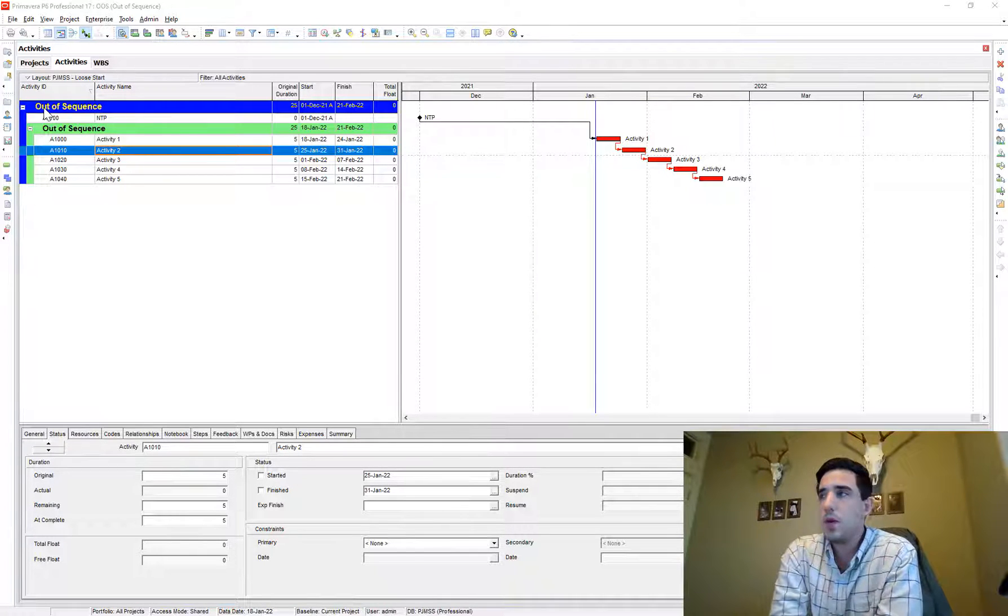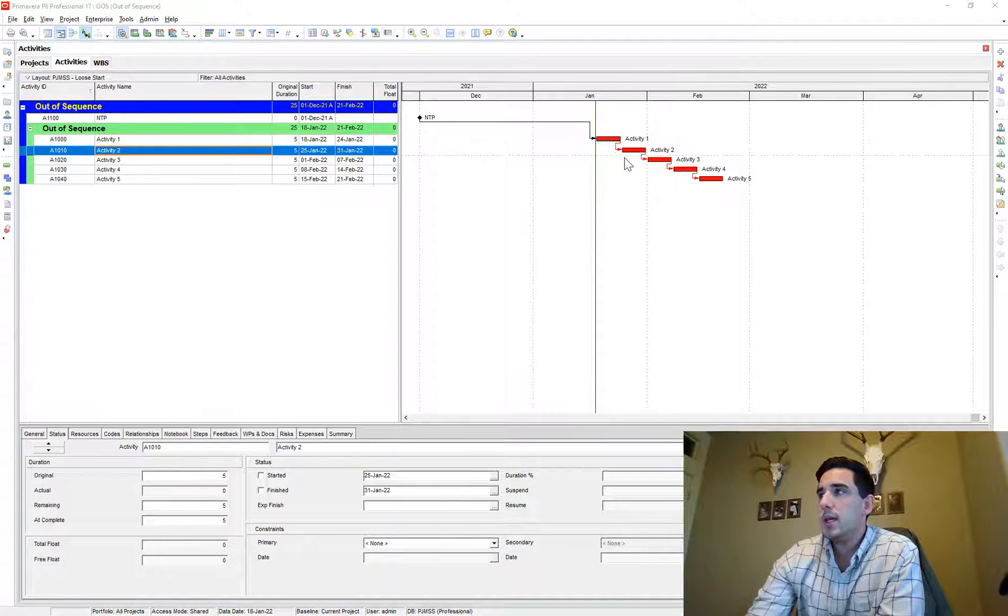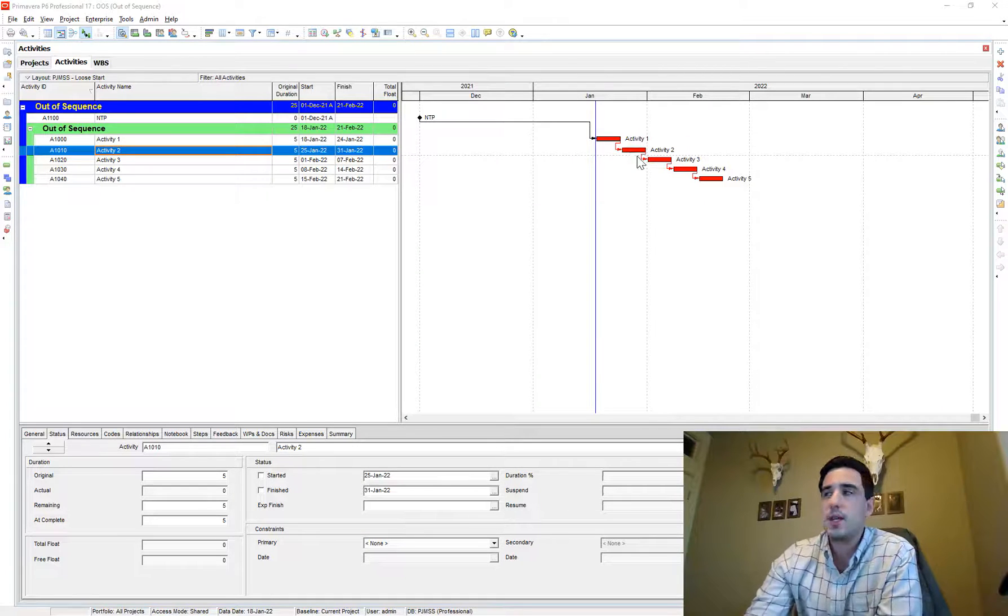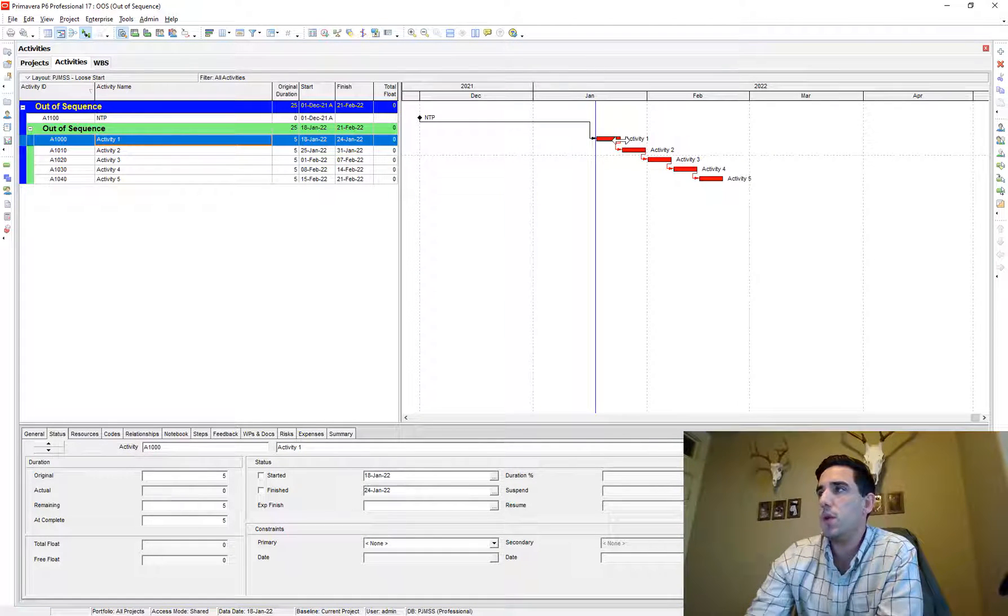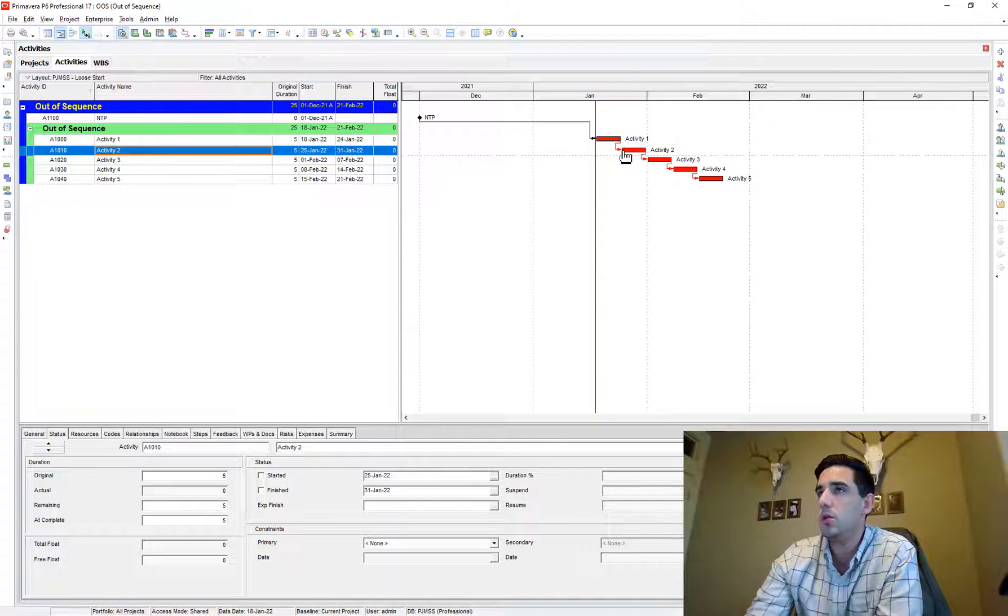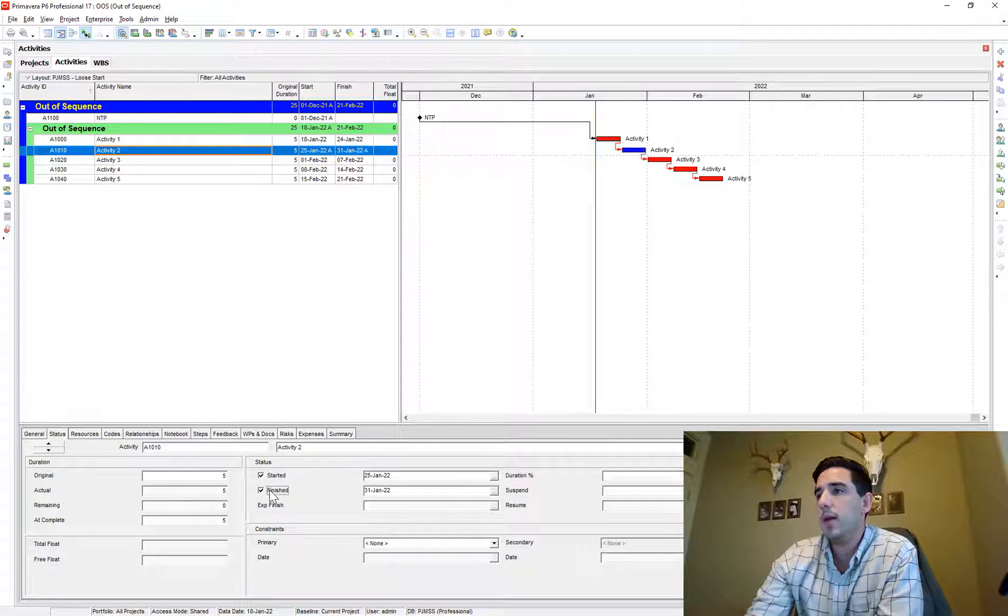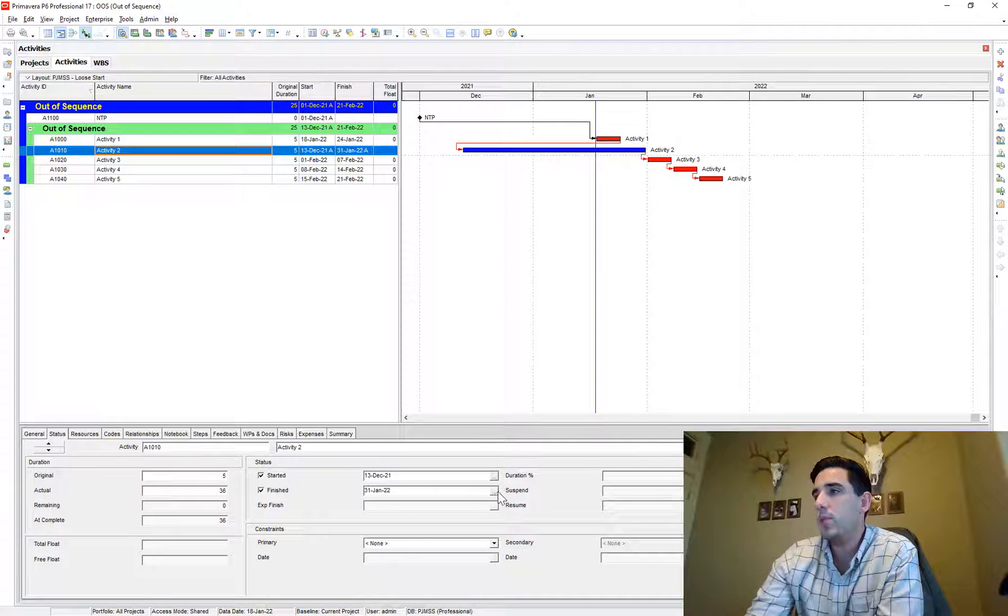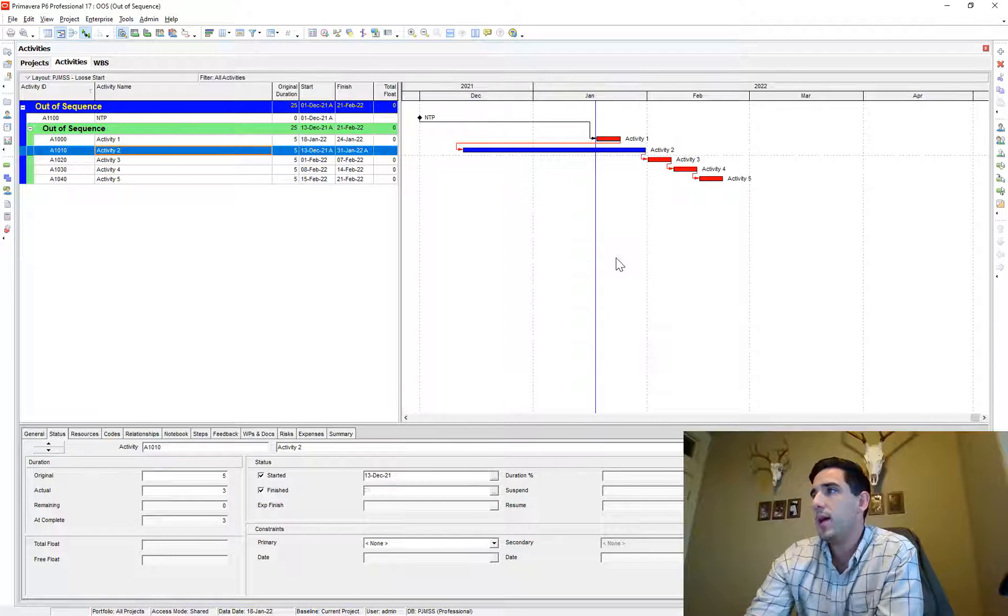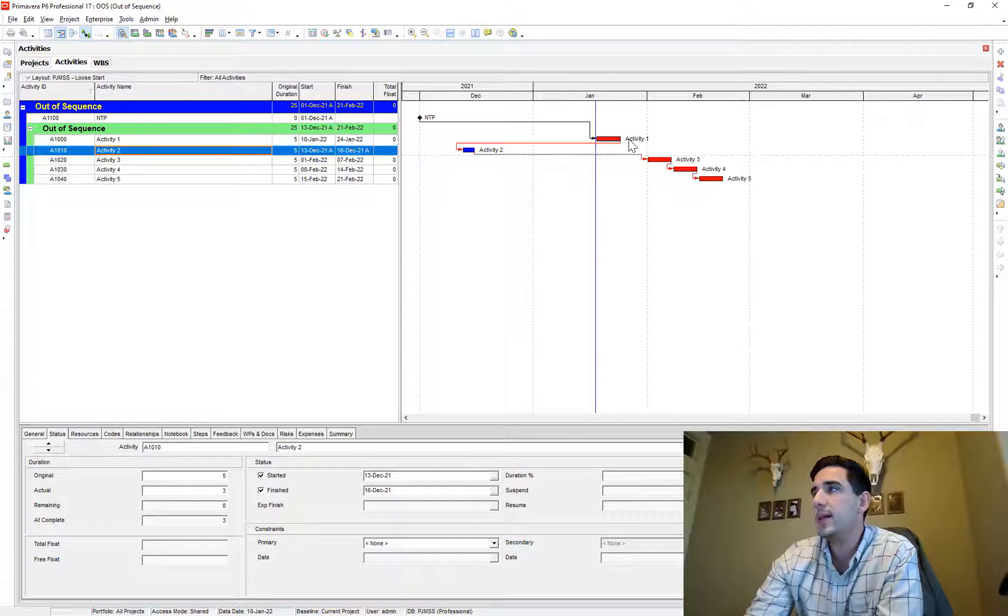So just for context, what is out of sequence progress? Well, all it is, is you've progressed your schedule in a way that doesn't honor the relationships that you have in your schedule. So for instance, we have activity one has a finish to start relationship to activity two. And so if I were to go and finish activity two when I do my progress, my schedule update, if I finish activity two, but activity one hasn't finished yet.